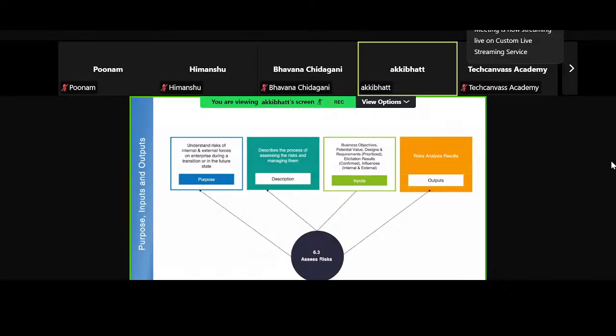Once you identify the risk, the next step is to plan mitigation strategies. It's an essential proactive action that will reduce the likelihood or the impact of the potential risks. For example, if financial constraints are identified as a risk, mitigation could involve prioritizing initiatives, adjusting budgets, or seeking additional funding. You know what? We will need some additional funding for this project to finish on time and have the resources allocated. If the limitation of the technology is a concern, the organization might want to invest in upgrading the system, or adopting some alternative options or solutions. And